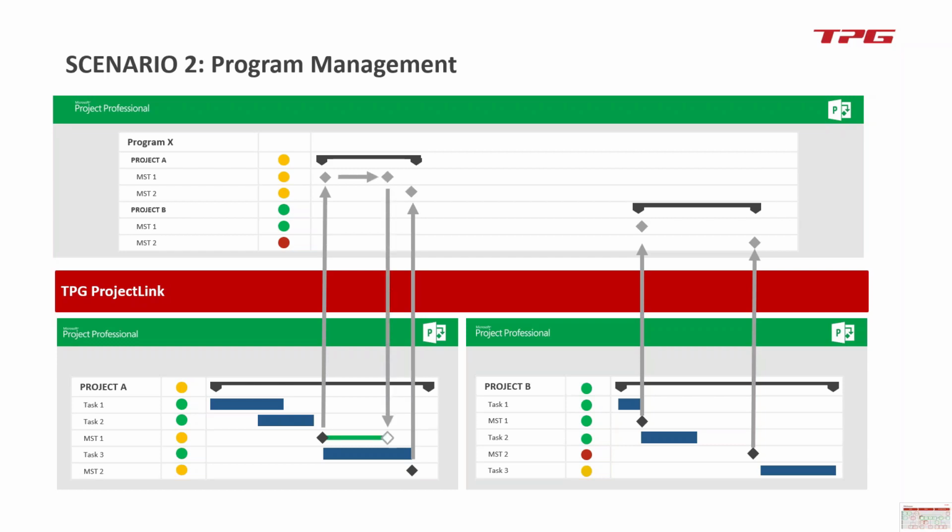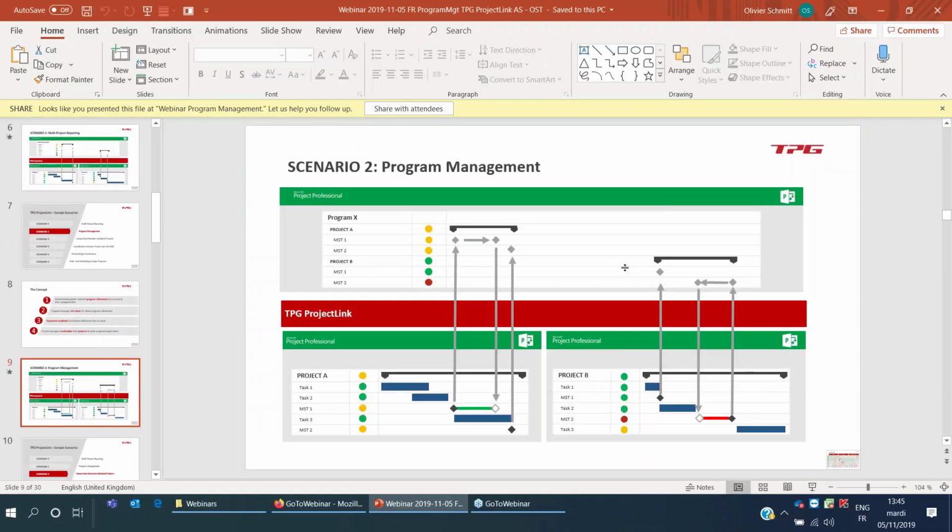And what the program can do is readjust milestone dates according to their own constraints and engagements and communicate back to the original project plan the new desired date of a milestone, whether it is earlier or later compared to the original picture. So it can be done both ways, and I'm going to let Stefan show you this demonstration live.